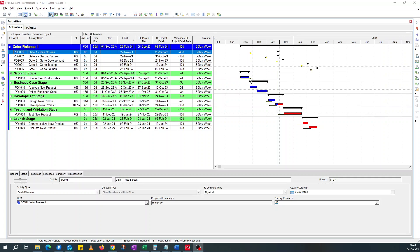So the Gantt chart, we've got the blue bar for actual and then the red bar is the critical part, critical activities. And the yellow bar in the second row is the baseline bar.